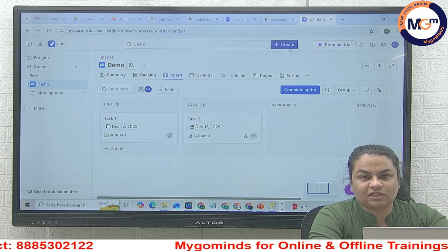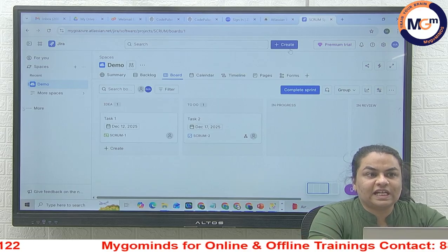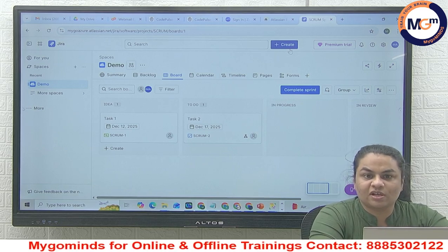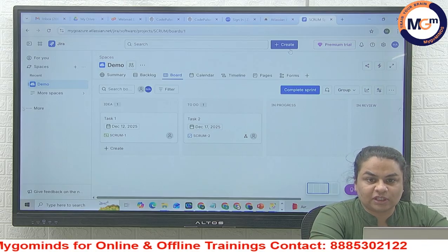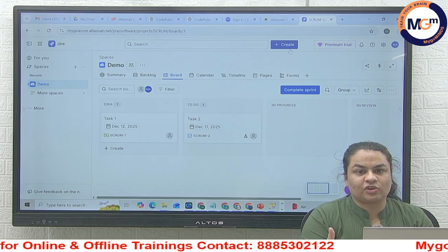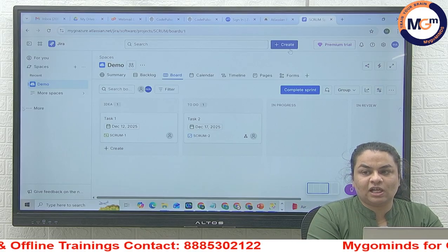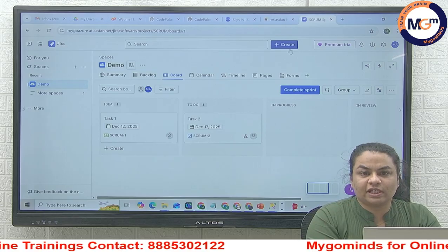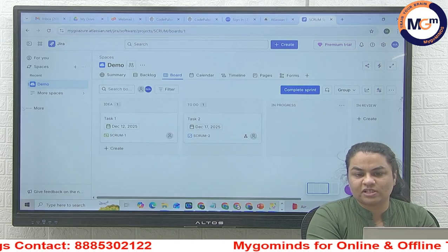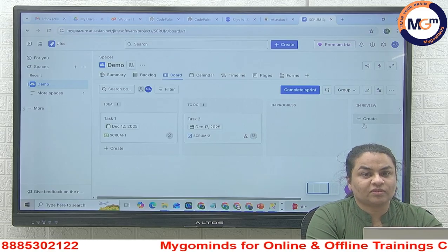They will be assigning the teams and who will be working on what, in which cycle. Let's say for every sprint we're going to have a minimum of 15 to 20 user stories, so we need a lot of teams putting their hands into developing those user stories to finish that sprint cycle. Depending on the teams and the resources available, everything gets assigned and they work on their part. Once it is done, we can see it move from in progress to in review and then to done status. Once it achieves the done status, it is done. So yeah, you are good.